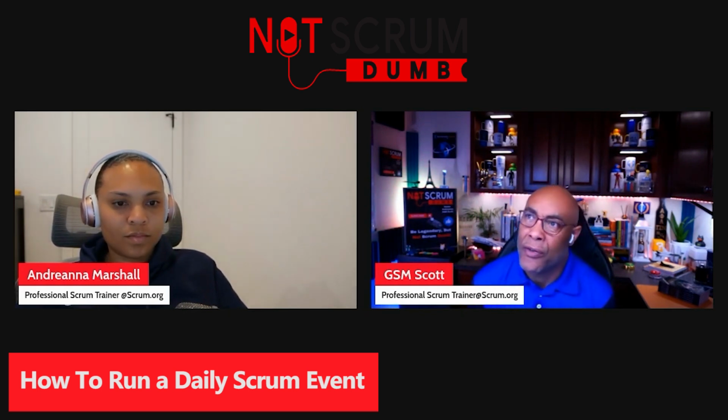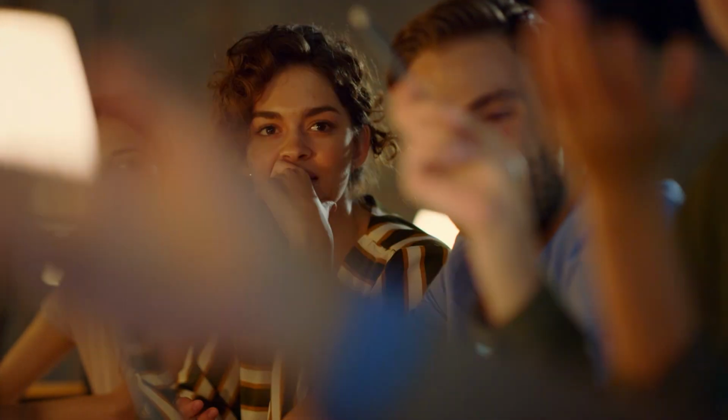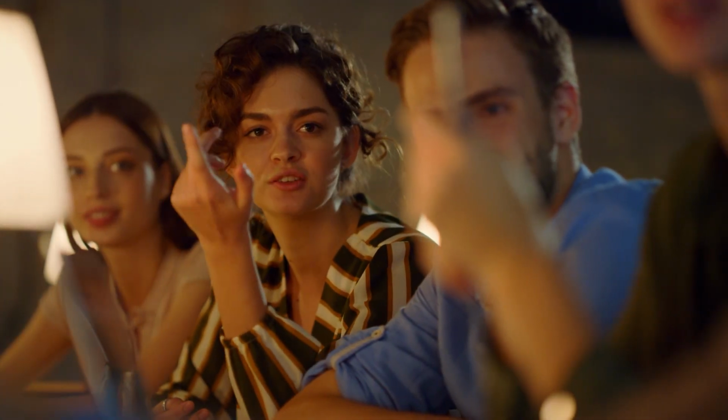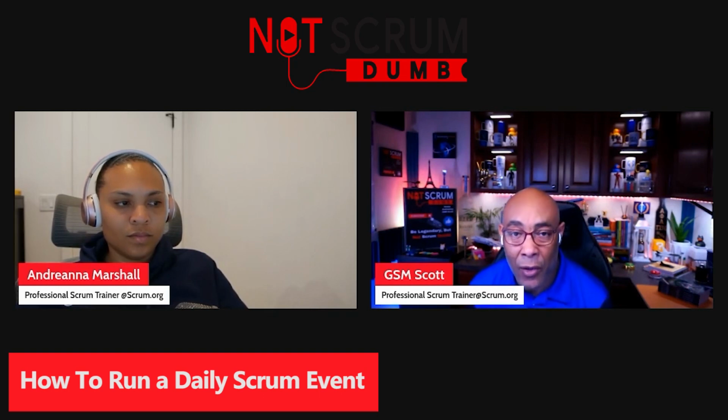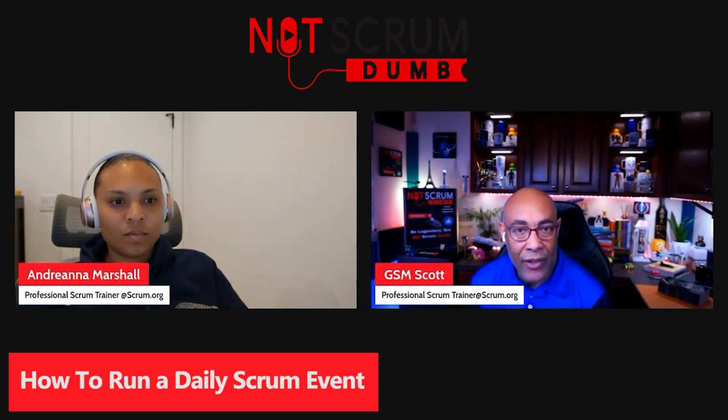And who owns this event? This event is for the developers. The Scrum Guide says this event is for the developers, by the developers. This is an opportunity for them to talk about what they need to talk about since they are the people doing the work. The Scrum Guide also highlights that if the Scrum Master and the product owner are there, they participate as developers.